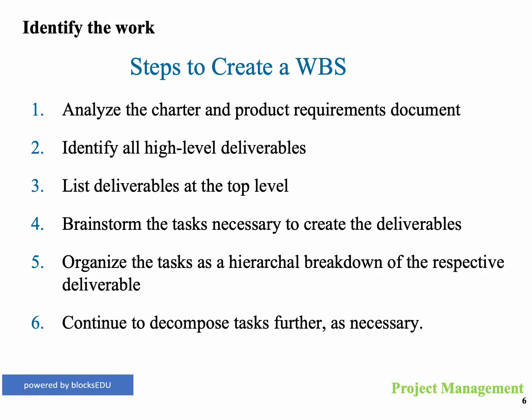So the question now is, what steps do we actually take to create the work breakdown structure? Well, first of all, we analyze the charter, the product requirements document, and any documents we actually have, a business case or any other documents that were produced prior to doing a work breakdown structure. We identify all the high-level deliverables, what things we need to deliver at the highest level. We list deliverables at the top level.